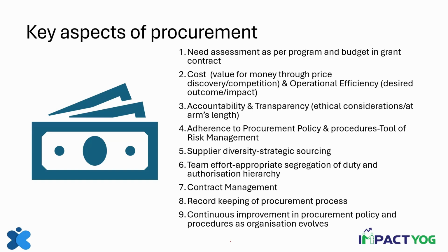So the key aspects of procurement is basically needs assessment. Now, how does the needs assessment come? For projects, it's very clear. It will be based on your program narrative or your program proposal that we studied in the grant management section, and the budget in the grant contract.